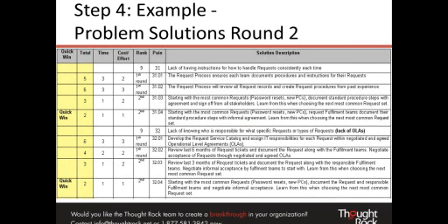Now we've come down into the second round of solutions, and this may be a breakdown of the solutions that were suggested above in the first round. So you might just pick one request and then start to document how to deal with that one request. Maybe you pick the most common requests. Whatever it might be, when we start to see the time factor of 1 and the cost and effort factor of 1, these form the quick wins.